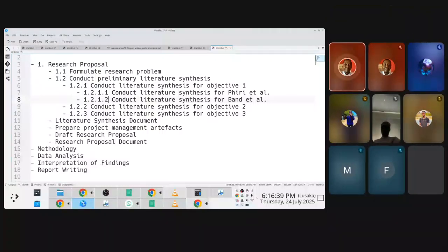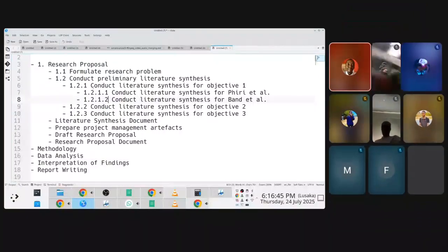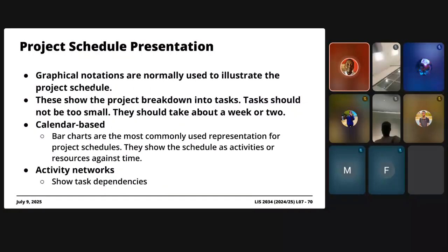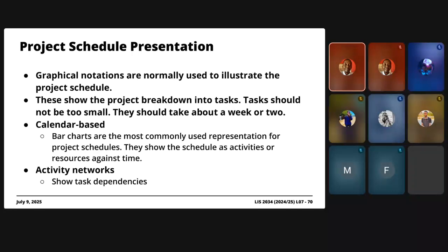And typically, a rule of thumb here is you decompose these projects down to a level such that you can easily assign what you've decomposed to an individual to work on. A task that you can easily manage. Right? So don't overdo this. And depending on the sort of literature that you'll be reading, there are certain numbers that are thrown around. Like, for instance, there'll be recommendations like make sure that these tasks that you're decomposing don't take less than a week, right?